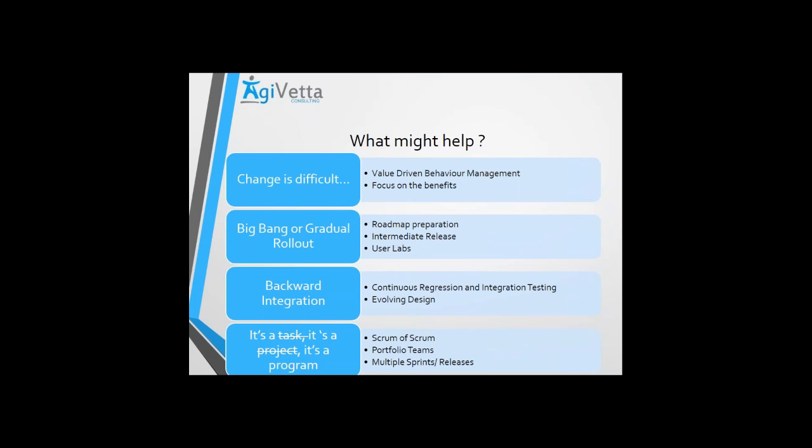When you have certain requirements which are more stable, where maybe 3-4 requirements are available, then you can probably start using sprints. Now within the sprints also, you will have to allocate time, which I call the PPF concept: past, present and future. So future will be this R&D analysis work that will help you in the next set of requirements. So you have to devote some time every sprint, right?